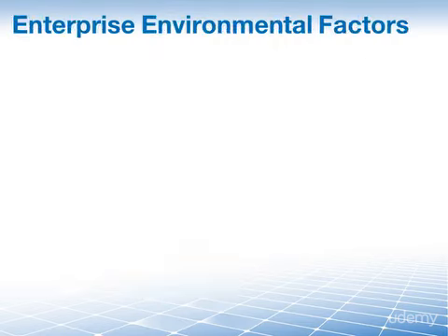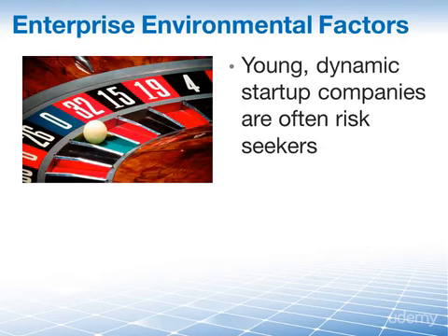From the enterprise environmental factors, we usually take risk attitudes, thresholds, and tolerances of stakeholders as well as the sponsoring organization. And the most important question is always, why do we need these enterprise environmental factors here? Okay, for example, a young and dynamic startup company is very likely to take on higher risk.